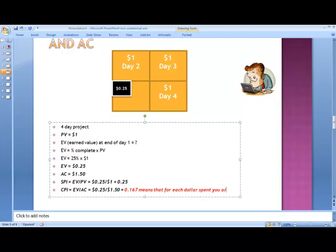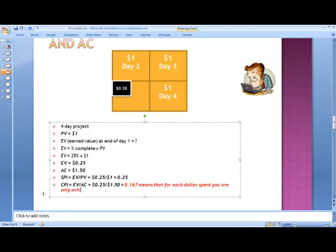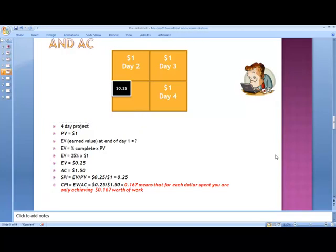What this means is that for each dollar spent, you are only achieving $0.167 worth of work. In other words, you're only getting 17 cents worth of work done for each dollar you spend. That is very, very bad. Not good at all. So you spend a dollar and you get 17 cents of work done.